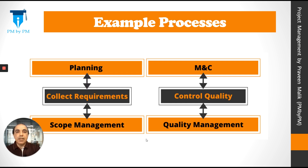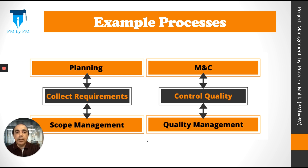For example, let's consider two processes. Number one: collect requirements. Collect requirements is the gathering of requirements and documenting what we have to do in the project. It's part of planning because we are planning something — thinking about the future and what needs to be done. It's also part of scope management because requirements belong to scope. Number two: control quality. Control quality is part of the monitoring and controlling process group because we are testing, inspecting, finding issues and defects. Similarly, control quality belongs to the quality management knowledge area because we are controlling the quality of a project. So each process belongs to one process group and one knowledge area.